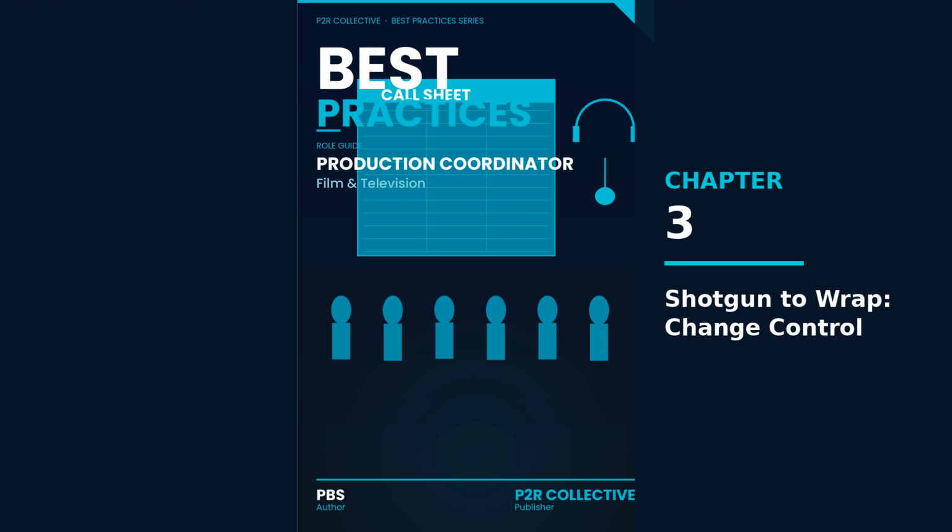6. Lock status rules for today. Priya instructs tracking to mark scene 12 shots as held, no done marks, scene 14 shots as blocked, not completed, and any scene 10 progress as completed only when the slate and notes confirm it matches the shot list.